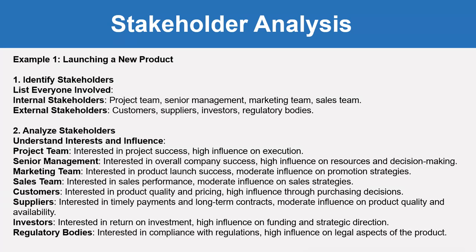Customers are interested in product quality and pricing, with high influence through purchasing decisions. Suppliers are interested in timely payments and long term contracts, with moderate influence on product quality and availability. Investors are interested in return on investment, with high influence on funding and strategic direction. Then regulatory bodies are interested in compliance with regulations, with high influence on legal aspects of the product.